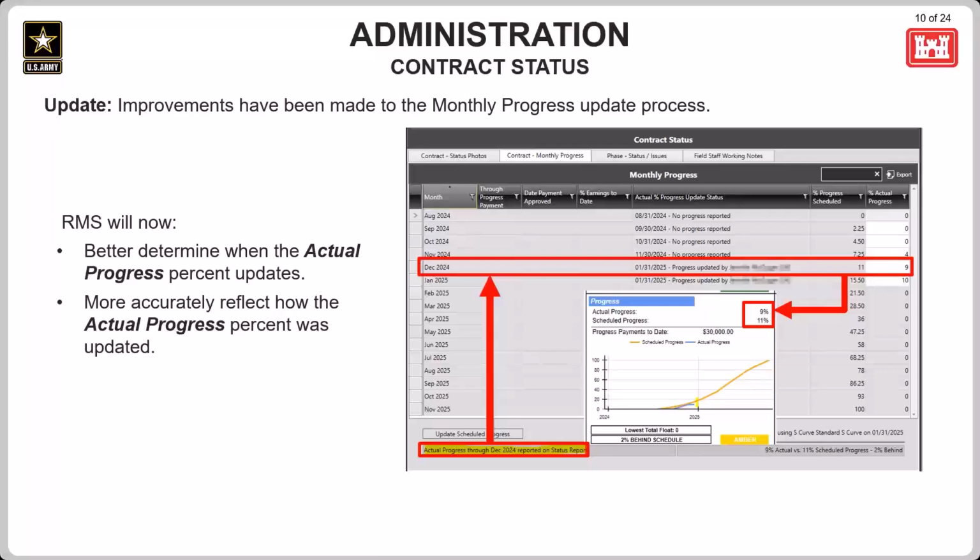Oh, so as soon as we're signed, it's already sent to the contractor is what you're saying? Effectively, yeah. So if we delete it, it doesn't delete it from both sides, it just deletes it from our side. Well, the whole problem was deleting something that was already signed. Yeah, the problem is we're humans and we make mistakes. I understand. But due to contractual requirements, it was signed, it was sent to the contractor. If they print it out, then we go back and delete it, we have now just altered the system of record. Okay. I guess either way, it's a mess, but I understand what you're saying.